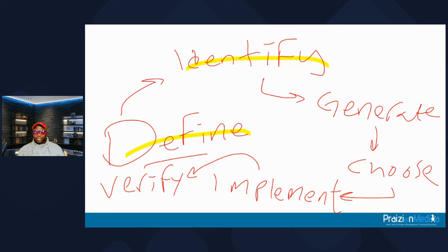Crashing and fast tracking are tempting, but you still don't know what the problem is. You're running late, but what is the problem? Will crashing solve it? It's not a given. Will fast tracking solve it? It's not a given, but you need to analyze. And when you analyze, then you know what's causing it. So the analysis, you want to put that in the mix. Generating alternatives and choosing the best. Those four, pretty much your exam success is going to rise and fall on how well you do those four.